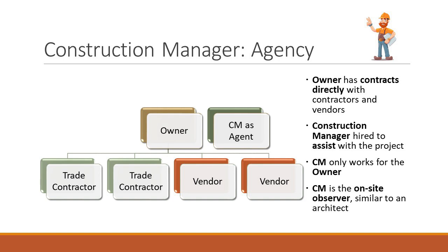You can also use a construction manager as an agent in your traditional triangle method. In fact, as projects become larger and more sophisticated, I strongly recommend that as well. Sometimes they're called an owner's rep, sometimes they're a construction manager. So, for example, the Haribo Candy Factory up in Wisconsin, they have an owner's rep / construction manager as an agent. It's a traditional triangle. They have an architect on one side, they have the contractor on the other side, and sitting out next to the owner, because Haribo makes candy, they don't build factories, we have a construction manager and agent. And they are intimately involved with everything in the project to make sure it's going well.